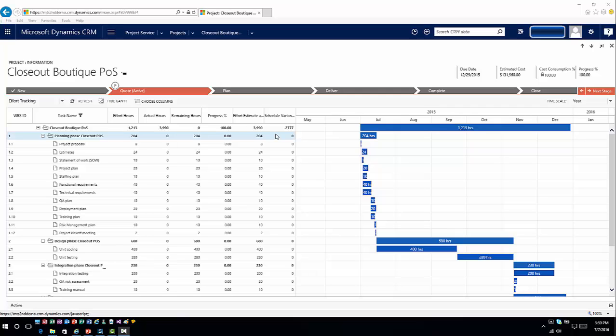Now, one of the things we didn't necessarily mention is the end user perspective. So people are going to start to get stuff assigned to them. So I'm going to know, okay, I've got X number of hours I need to work with. So once people get assigned a resource record that's associated with them, now they can be added to the project as a resource, whether it's a developer or whatever specific type of project scenario that you've specified. And then tasks can start to get assigned to those individual people.